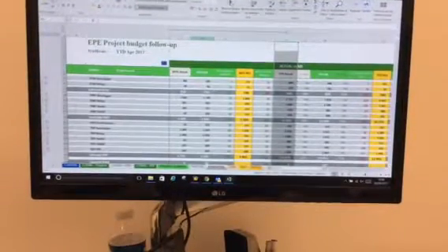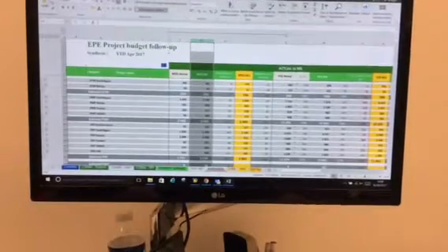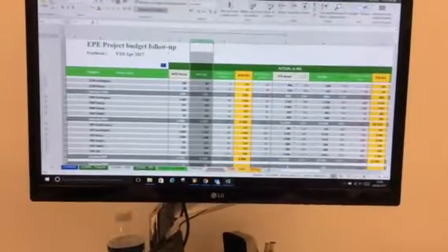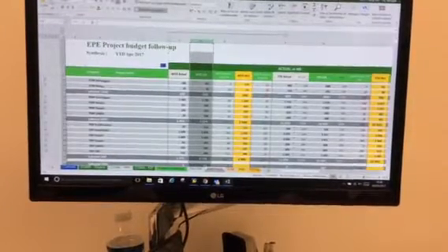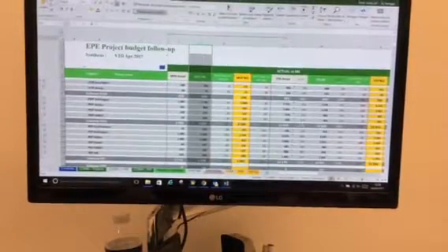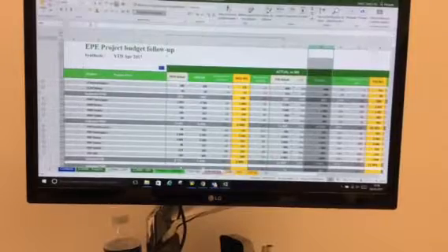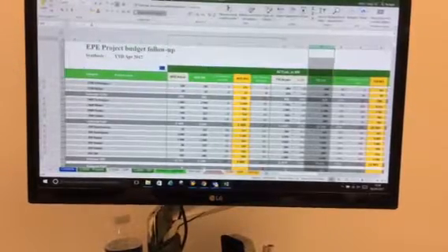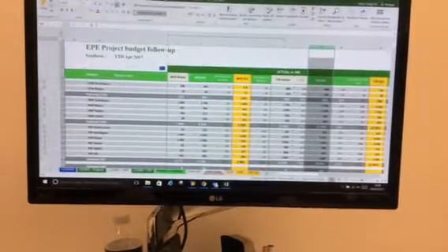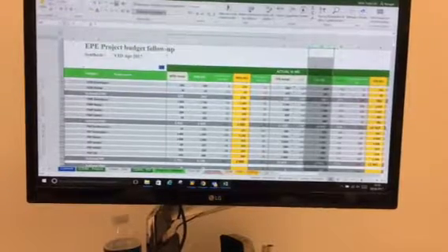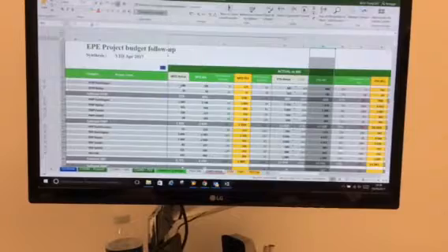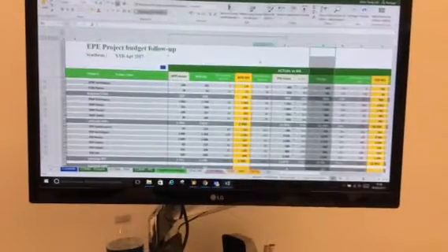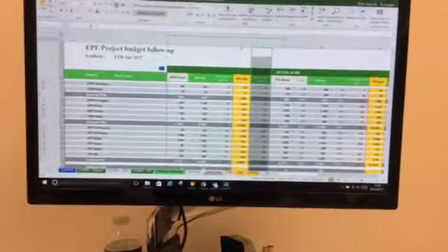And I compare with MS. So what was forecasted in MS? Here are the figures forecasted for the month of May, and here are the figures forecasted during the period from January to May. So switchgear is above the budget for this month, but in this year it's still under the budget, right?